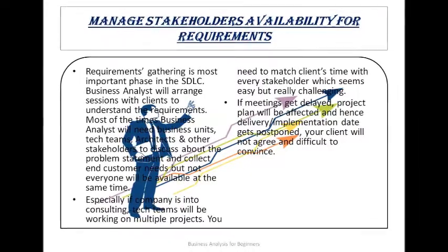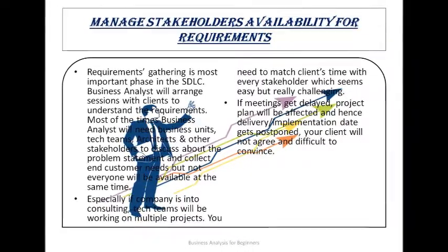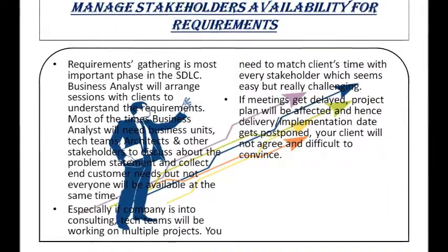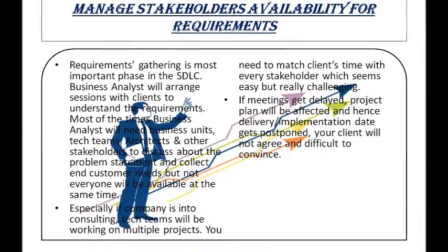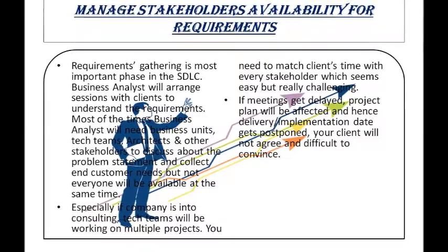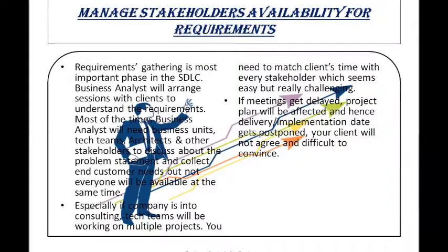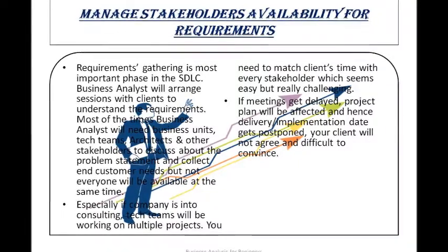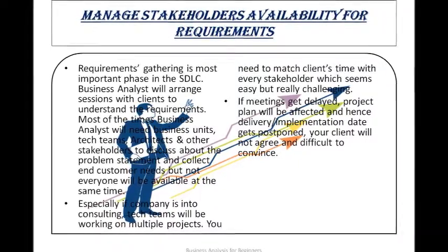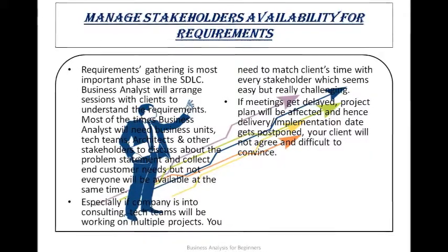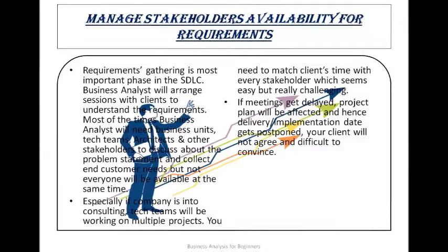As we discussed previously, once requirements are signed off from the client, any changes to the requirements will have impact on cost and schedule. So change management needs to be involved, i.e., client should agree to provide more cost and additional time to deliver. Most of the time, clients will not easily agree to the additional cost and time. This will require some sessions to convince clients.